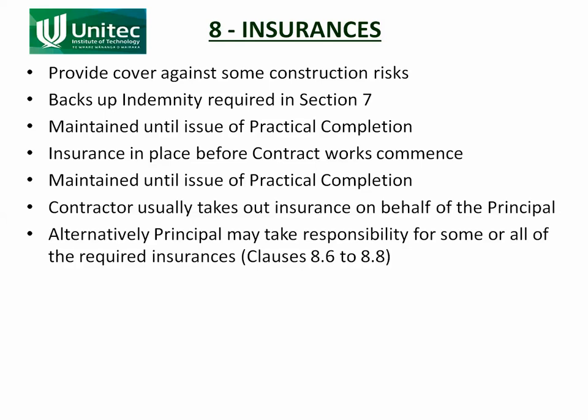However, the principal may also decide to take responsibility for one or all of the insurances. For example, a council may be able to get a better rate on insurances than a contractor. So the contract document will say the contractor doesn't have to take out the insurances — the principal will do that. Section 8 in the Special Conditions specifies who is the person taking out each one of these insurances. The contractor pays premiums monthly to maintain the insurance and passes the cost on to the principal — it will be sitting in his contract price. So if the principal can get a better deal on insurances, it's worthwhile taking over that responsibility.